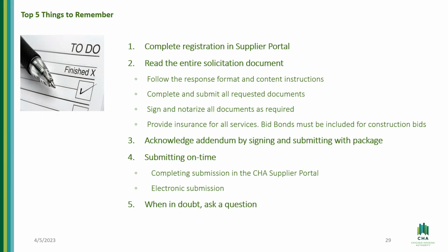The third thing is to acknowledge addenda by signing and submitting them with the package. I mentioned the addendum at some point of this presentation. An addendum is any change, correction or addition to the solicitation. So for example, if they're changing the due date and time, you will receive a letter by way of an addendum. That addendum or that letter, you have to sign that you have knowledge of that change and submit it with your proposal.